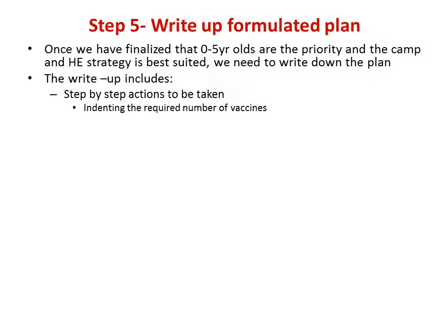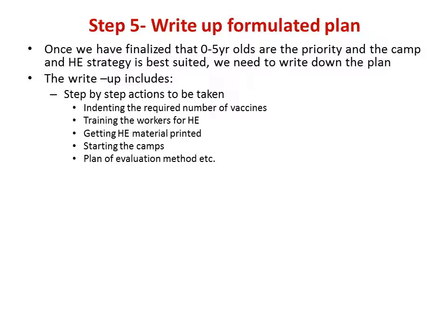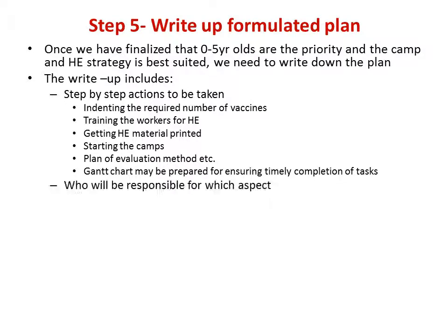That is, when will the vaccines be indented, when will the training sessions be held for the workers for health education and workers for vaccination, when will the health education material be printed, the dates of starting the immunization camps, what will be the plan of evaluation, and a timetable can be prepared for ensuring timely completion of tasks. The write-up will also name who will be responsible for which aspect of the plan.